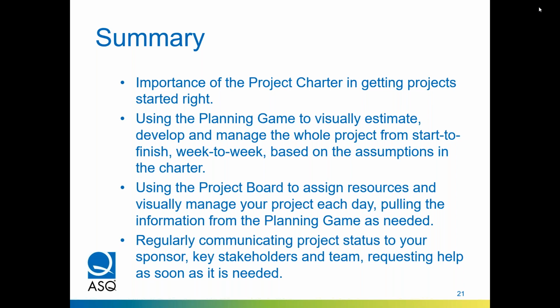So what can happen is you can ultimately start adjusting the planning game as well. So you'll see what the knock-on effect is, for instance, if some of these tasks take longer than you thought. The other thing, remember, each week you're estimating. So you've got another learning loop in there to improve really the visibility of the whole project. And again, it can be communicated to everybody on the weekly status report.